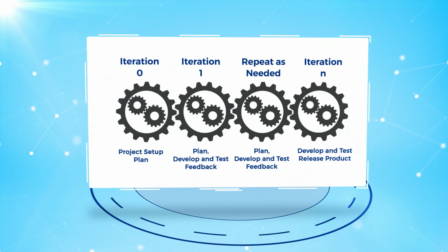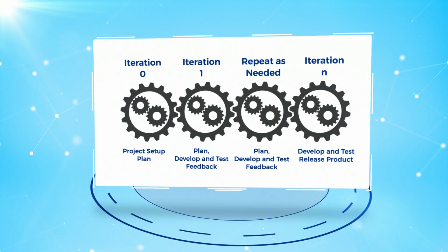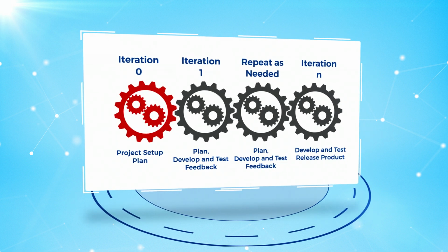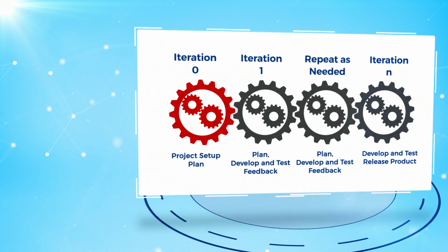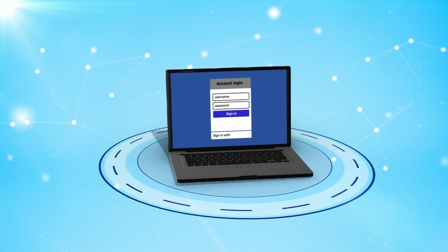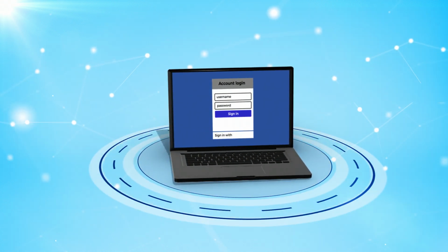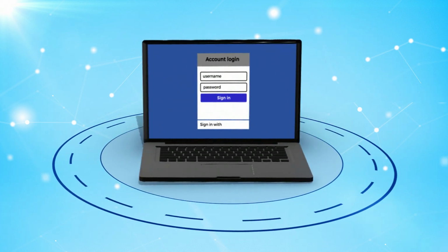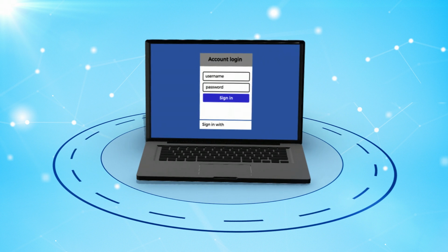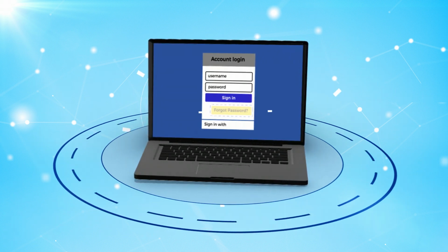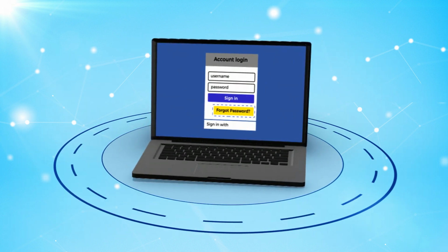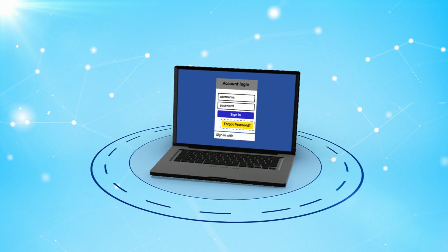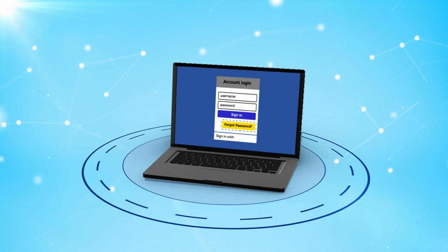Agile project management is additionally considered an iterative model. So not only are you building the pieces of your final product incrementally over time, you're also iterating, meaning in the first increment, you might initially build the minimum features that are required for your product, such as login functionality. Then, once you've tested that functionality, in the next increment of work, you may build more robustness into that feature. So you're incrementally adding different features to your end product and adding robustness to your features with each iteration.